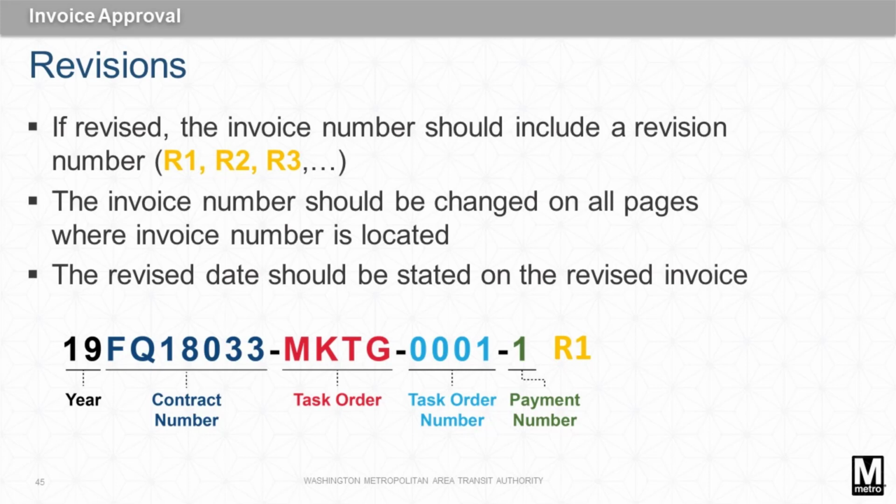The original invoice file should be renamed as void in Procore. It is advised to keep the original file in the Procore attachment list, but ensure it is marked void, so the correct or latest file is reviewed and processed. WMATA reviews the invoice again and approves it for payment. If approved, WMATA makes payments on Tuesdays and Fridays.